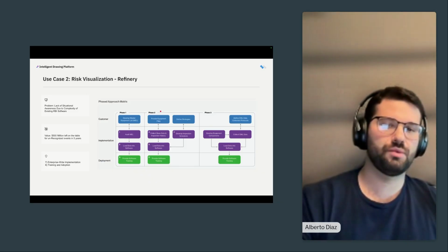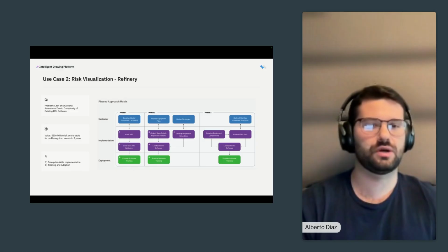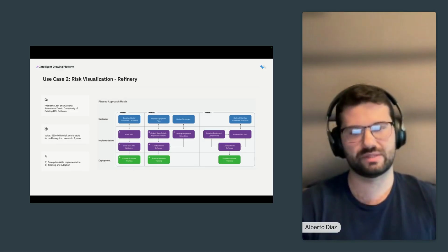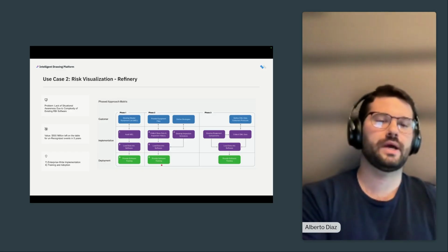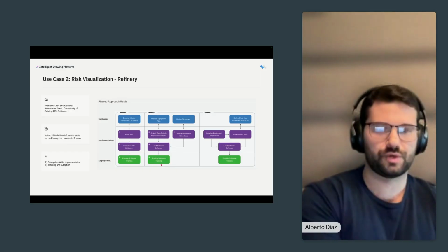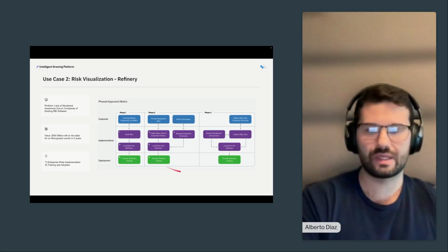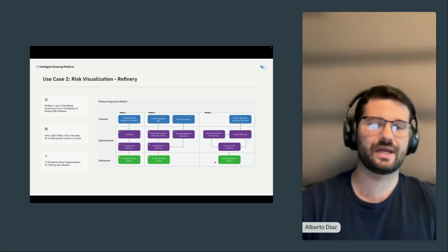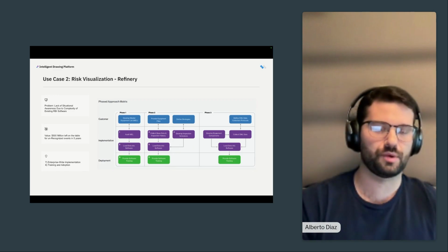At the end of each and every one of these, we're basically complementing the database with additional information coming from other data sources, manufacturing files of the equipment, and inspection histories. And at the end of these phases, we're always going back to the user base and providing the training with the now complemented information that exists within the system. Same thing happens at the third phase, when we're connecting and linking to alternate systems, and also including the CML data as part of the program.